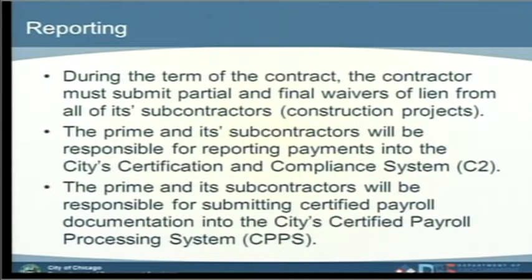Now we're going to cover what is reporting. During the term of the contract, the contractor may or must submit to the Department of Procurement Services partial and final waivers of liens from every one of the subcontractors. The prime and the subcontractors will be responsible for confirming into the city certification and compliance system that we call the C2 system.